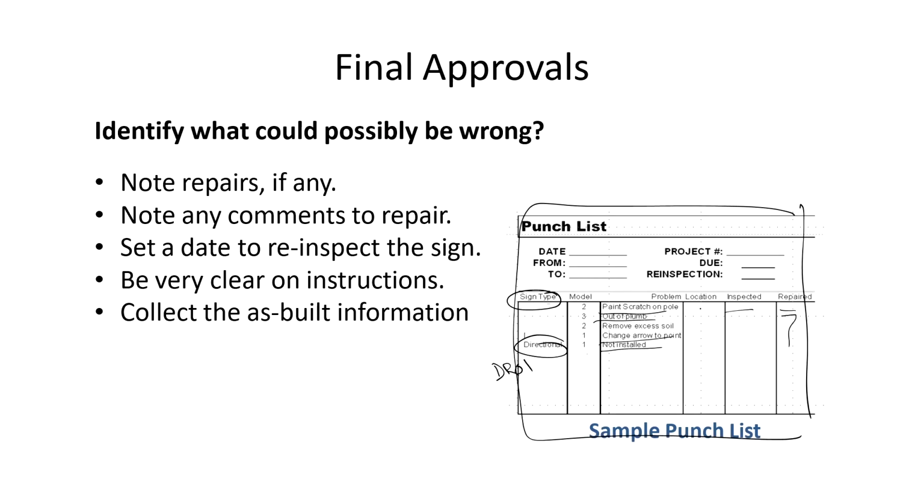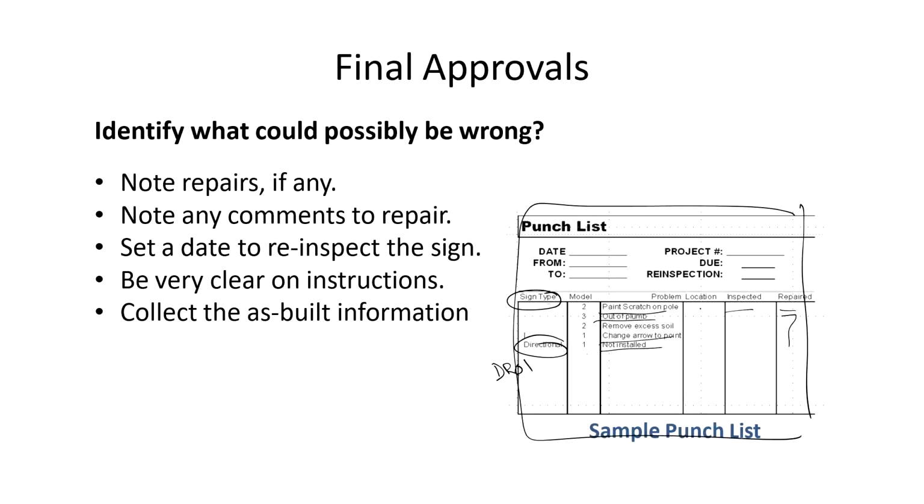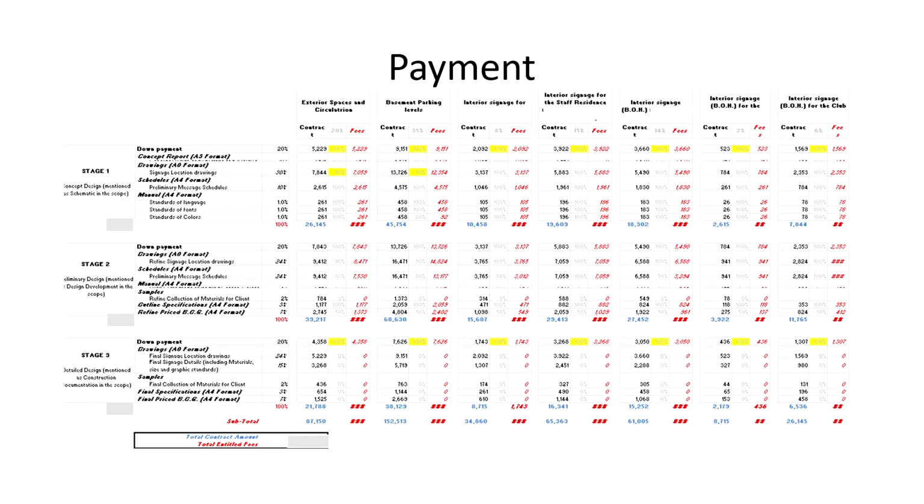So, we have to do the detailed costing and give them the proposal that these were the changes listed later, we need to make these drawings or changes, and this will be the budget. I have taken one snapshot from one of the projects showing how the payment happens.